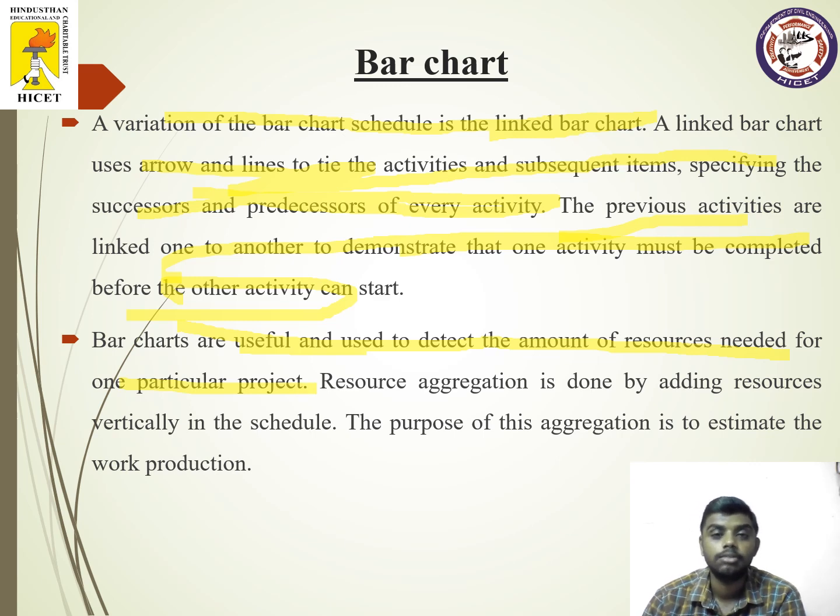What are the kinds of resources? What is the amount of resources that is required at various points of time? You may not actually require paint at the starting point of your project. Actually, painting is going to be done at the end of your project. You need paint at the end. It is not at the starting point of your project that you go and purchase paint. So that can be clearly confirmed from these bar charts.